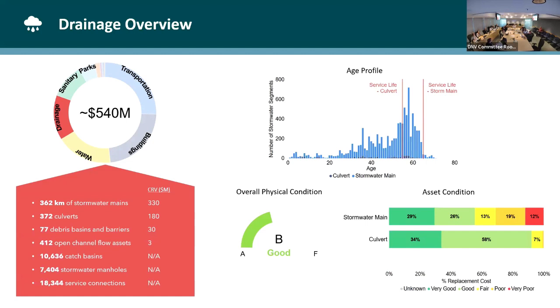Yeah, so there are two pieces here. One, as we go through our annual capital program, particularly looking at the 10-plus year horizon, we start to put some of these assets into that really long-term planning aspect. But I'd really point council to, I think it's slide 3, where we have that graphic with the curve. With these particular assets getting closer and closer to their end of asset life, it might be considered good today, but if we continue leaving it, it's going to go exponentially worse very quickly. That's what that graphic is identifying, without us coming in and intervening now. So the longer we leave something past good, the more we can anticipate it costing to bring it back up to an entire condition. I don't know if anyone else wants to add anything?